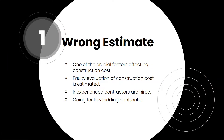Wrong Estimate. It is considered the most crucial factor in increasing the cost required to complete a construction project. Many inexperienced contractors don't have proper knowledge of the industry, and that is why they estimate the capital needed for a project less than the actual one. On the other hand, project owners assign their project to bidders who give less estimation considering it convenient, but they make a big mistake here. A faulty evaluation potentially causes cost overrun.